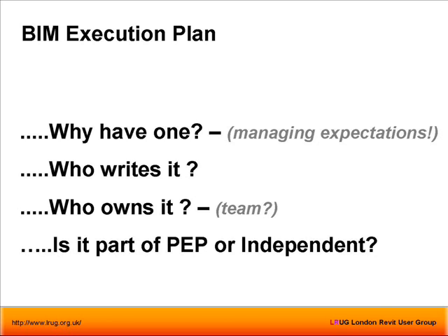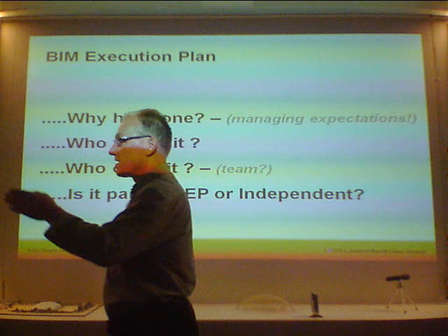That's why I think the BIM execution plan sets expectations. Yeah, that's pretty much the formation of the Penn State one. If you look at it, they did their research and found 25 uses for a BIM. And then at the beginning, you scope out what you're going to try and do with the BIM, and you use that to shape your process. It's a good method of driving a plan. Yeah, we see lots of PQQs coming through with it, and they've gone well.